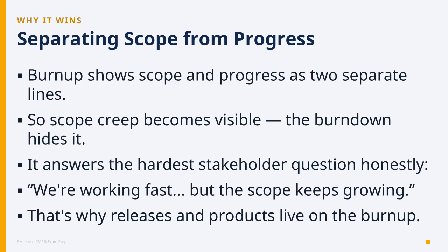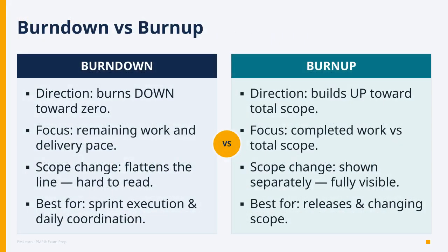This is critical for stakeholder trust. When a project is late, the Burnup shows whether it's a pace problem or a scope problem. Two very different conversations. Here's the side-by-side.